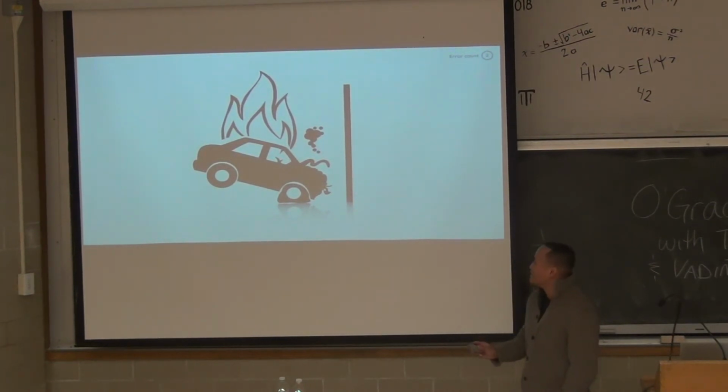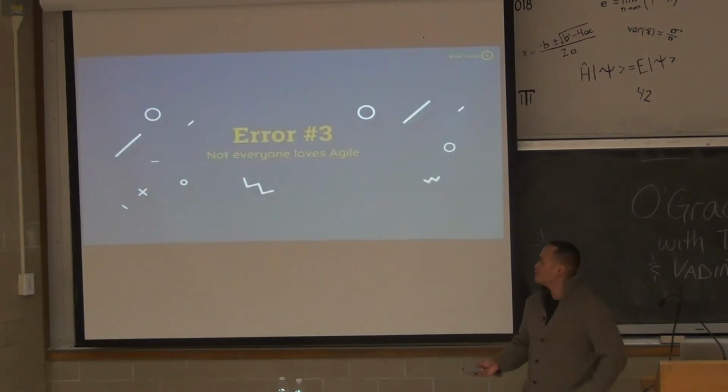So it's coming out. Like we mentioned, we were running Agile, and this was typically a waterfall organization. Agile didn't work with these guys. As you know, Agile's fast. You have to make quick decisions, and you have to iterate. These guys wanted a clear plan, clear objectives, and clear outcomes on a Gantt chart, pretty much. This was a very important detail for them. We were trying to stick to Agile, it wasn't working, and we had to come up with a new plan.